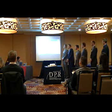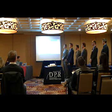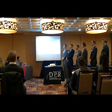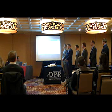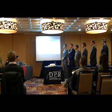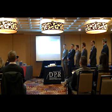So, some value engineering proposals that we have thought of. First off, being reuse of asphalt. At the beginning of the project, there is some demolition of existing pavement. So if we could store that and use it later on in the project when we do have to pave, it would help save costs and it'll help with the BEAD requirements of reuse of materials.